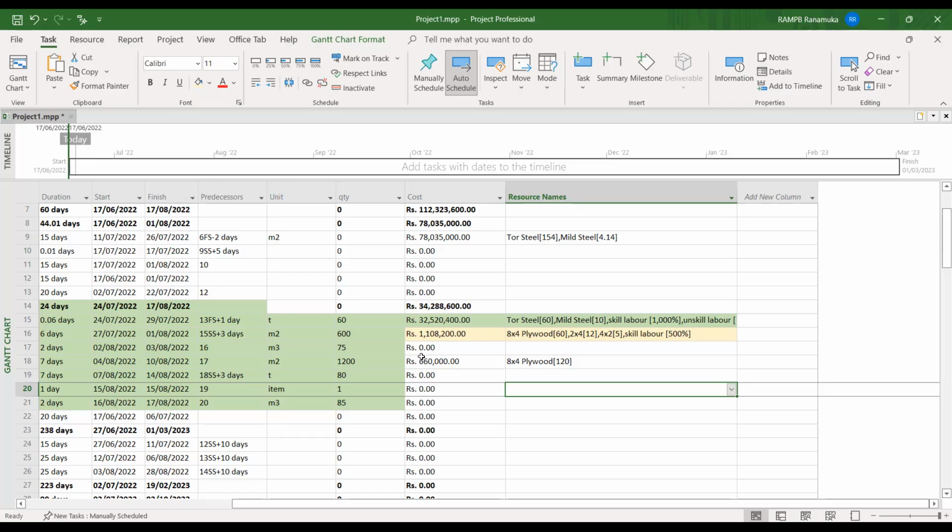And second, most construction companies do not consider the material too much. They consider the material and the profit. For example, in the electrical work, they are not doing the electrical jobs with their own resources. They give that to subcontractors. The plumbing is also done by subcontractors, who are labor contractors. So most of the time they are not using all kinds of resources, only what they need, the available labor as well as the equipment.